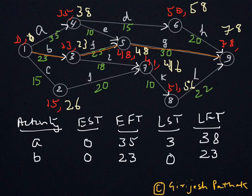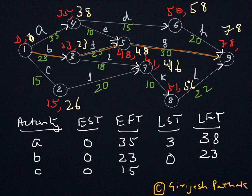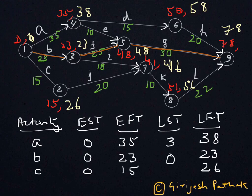For activity C: it starts at node 1, so the Earliest Start Time is 0. Adding the activity time of 15 days gives an Earliest Finish Time of 15. The Latest Finish Time is taken from node 2 where activity C ends, and the latest time there is 26, so the Latest Finish Time is 26. Subtracting the activity time — 26 minus 15 — gives a Latest Start Time of 11 days.